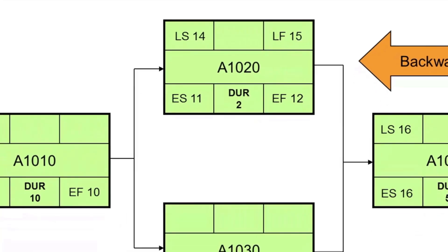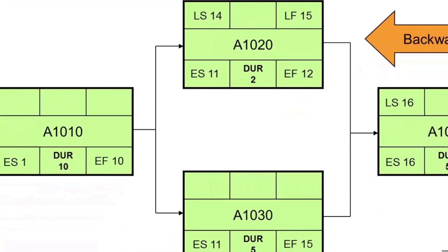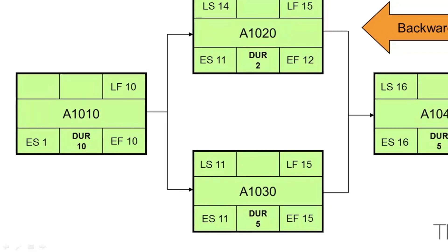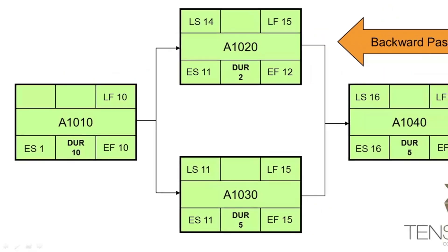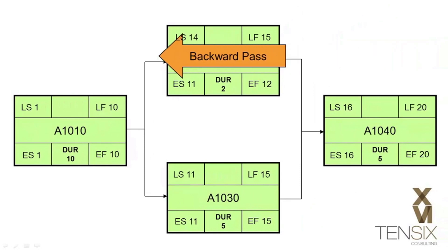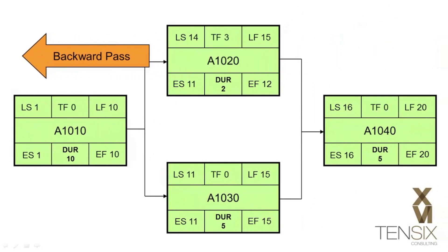Activity A1030 also has a late finish date of day 15, minus the duration, plus one to get a late start date of day 11. And finally, activity A1010 also has a late start and late finish date equal to its early dates. This completes the backward pass.